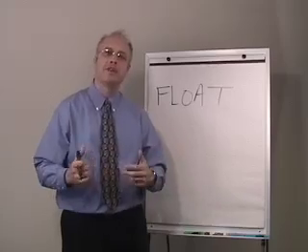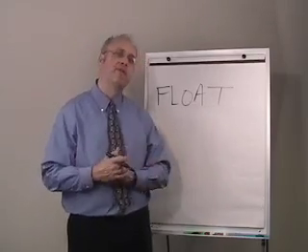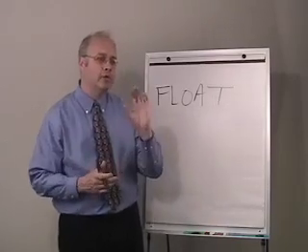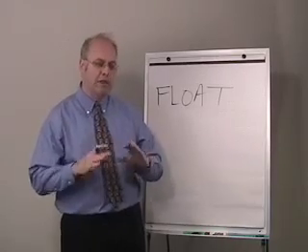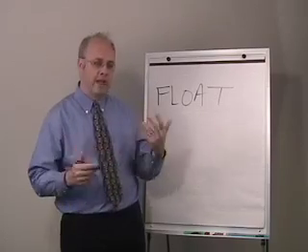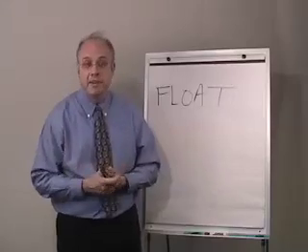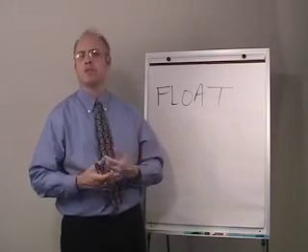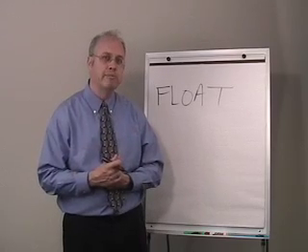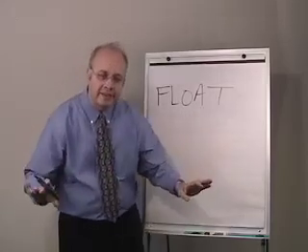Typically, the answer to that question is first come, first serve. I think if it's something that's going to be something of a bone of contention, I think it makes sense for the parties to communicate and talk about how much float really exists for an activity, particularly if that float is going to be used to level a contractor's resources. So if that conversation comes up on the project, I think it's helpful. Oftentimes it doesn't, and typically in those circumstances, it's more or less a first come, first served basis that float is available to the project participants. That's if the contract is silent.